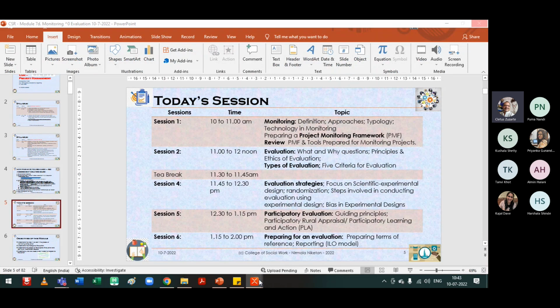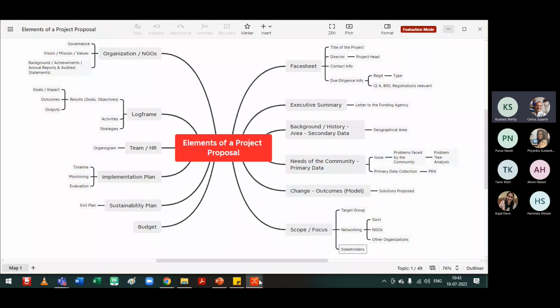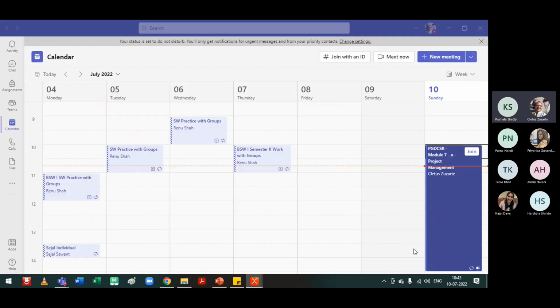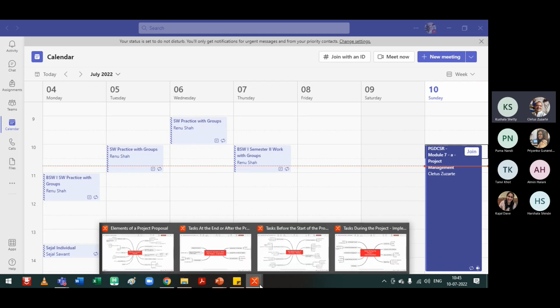When we did the proposal, we already submitted the needs assessment and baseline. Normally, there is a gap between the proposal and the execution, so we do the baseline all over again. Very good, that's an important point, because normally there's a gap of 3 to 6 months by the time we propose and get approval. So this is what I do. The needs assessment is done a little superficially, but the baseline is done all over again because I run a malnutrition project. The status of the children at that particular time is very important for me because I'm going to track that data.